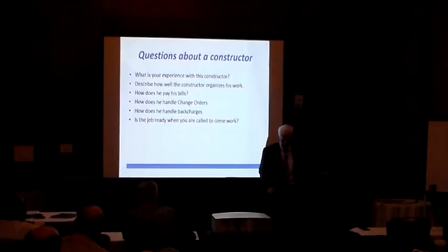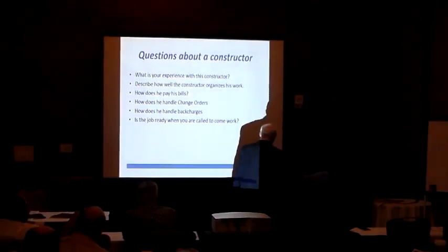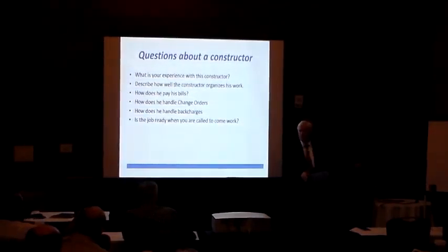One of the things that I do on all of my contracts is I have the right to refuse any subcontractor right off the bat. So I get them to send me a list of all the subs that they're going to use on the project. If I see 1 or 2 or 3 on there, I'll call the contractor and say, look, we can't use these, even before we get the project started.